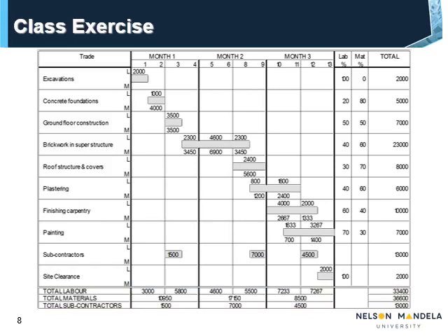You will note that the total labor has been allocated columns for every 2 weeks. Remember, labor will be paid every 2 weeks, whereas materials and subcontractors will be paid every month. On the right-hand side of the bar chart, you can observe an additional 3 columns. These columns indicate the ratio of labor versus material cost, relative to the total cost allocated for each activity.